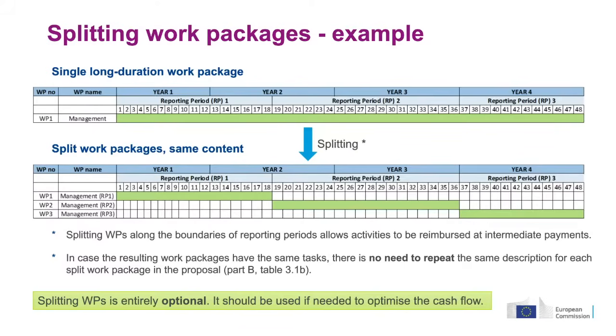So to have one-beneficiary work packages or work packages that are really only single tasks could really be a minus in the evaluation. While you are absolutely allowed to split work packages to address cash flow problems, make sure you don't use this excessively and that your work packages are still a meaningful part of the project.